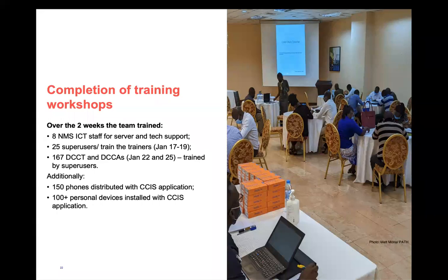So over the 2 weeks of the deployment, we trained the 8 National Medical Stores technical staff who are responsible for the server and the maintenance of the technology side of the application. The 25 super users for training of trainers the week before, and then we did the 167 technicians the week of January 22nd to 25th over 2.5 days. We distributed over 150 phones to the users with the app preloaded on it, and then also loaded it on about 100 personal devices, because it's an Android-based platform.